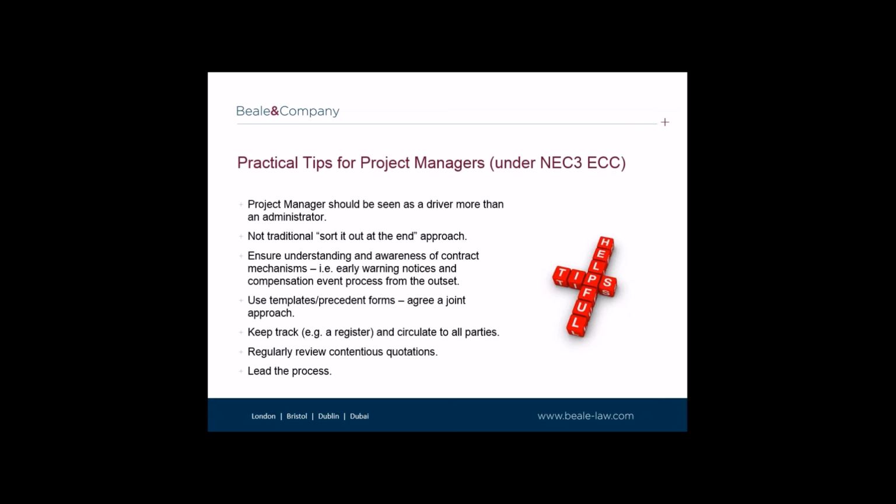It's also important for the project manager to keep track and keep a register of what's happening, which is circulated to all the parties. As we've said, not to keep banging the be-proactive drum, but the project manager really must stay on top and keep track of the various notices, the program, the risk register, and ensure that all of these matters are followed through and tracked through if the parties are perhaps slipping up or falling down. The project manager really needs to be reminding them and chasing them along the way. And a register can be an invaluable way of doing that, especially when it's circulated regularly to all the parties.